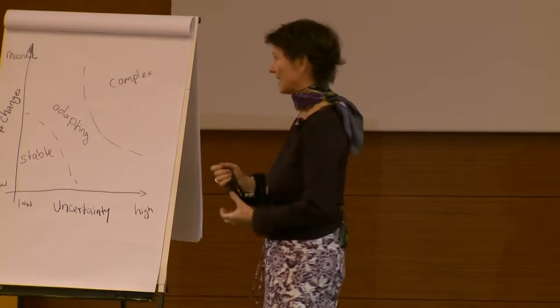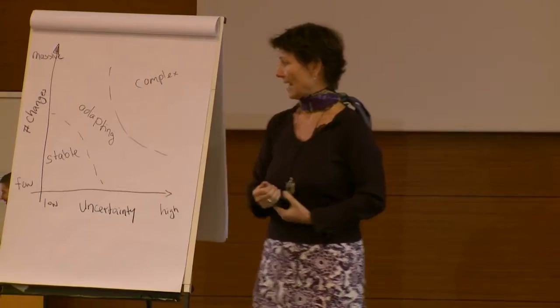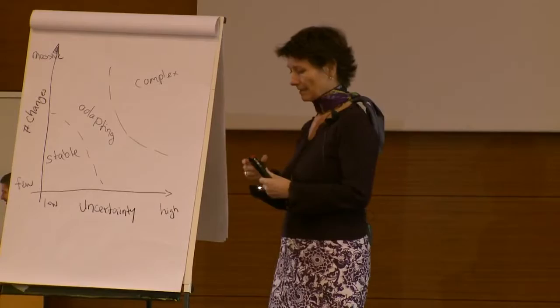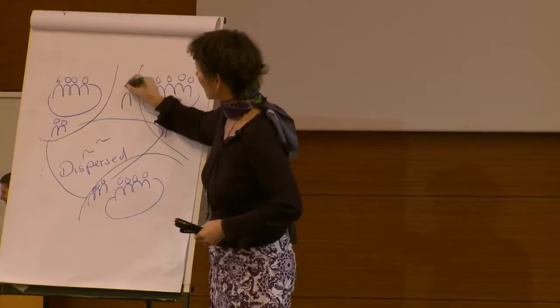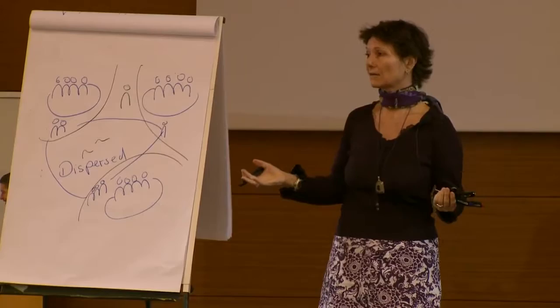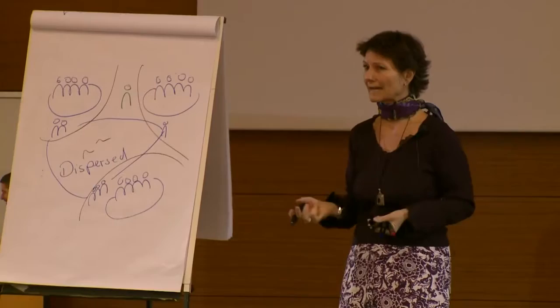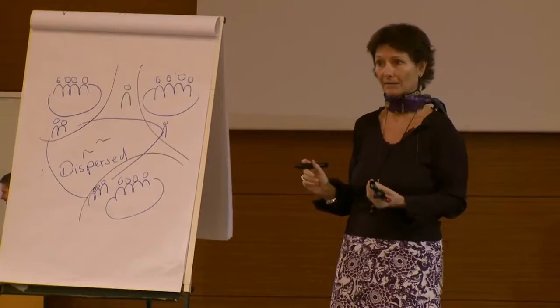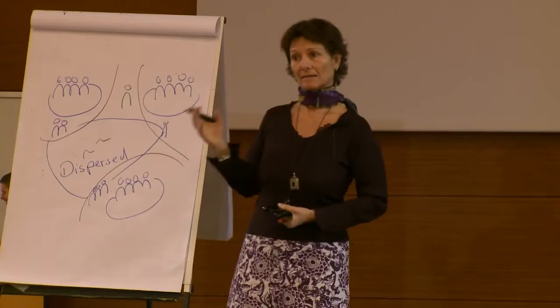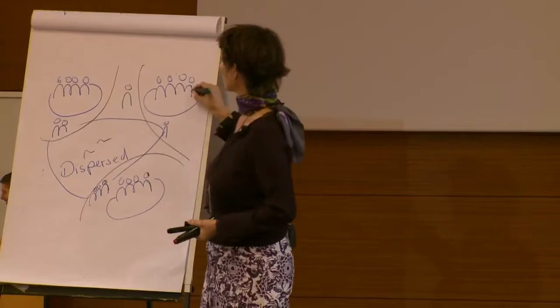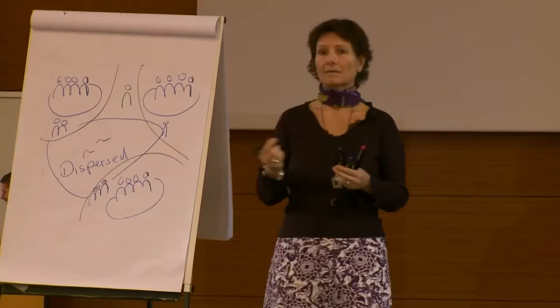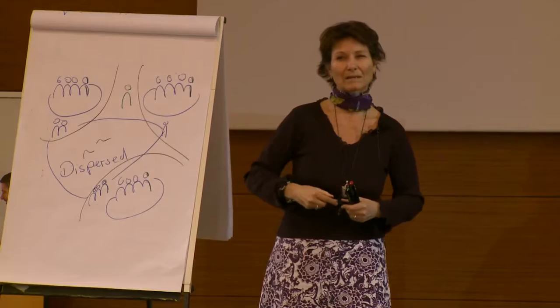So let's start here. If we are in a stable world, a typical answer for that is something like a chief architect. It's pretty stable, it's not a lot to look after, but every once in a while we need to have a decision and we need to ensure everyone understands the architecture, so there's somebody ensuring that. Another thing that we are implementing, and typically it's either or, either we have a chief architect or we have like in every team one person taking responsibility for architectural decisions, and that's typically what's better known as community of practice.